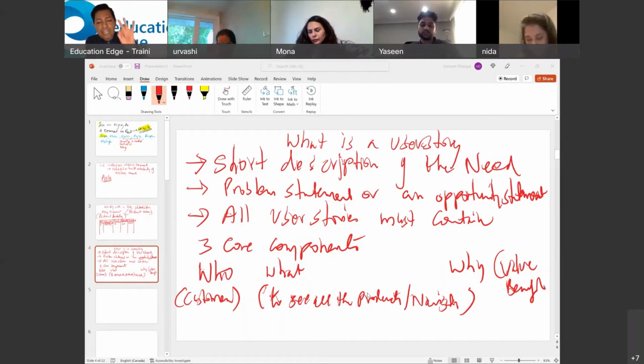So every need or requirement in Agile, we call it a user story, must satisfy this criteria of three components. It's all about, as I said, requirements are the stakeholders' perspective. They're not your perspective. So how do I capture my stakeholders' perspective? I capture it by asking probing questions. What are the three probing questions associated with the user story? We ask who, what, and why.